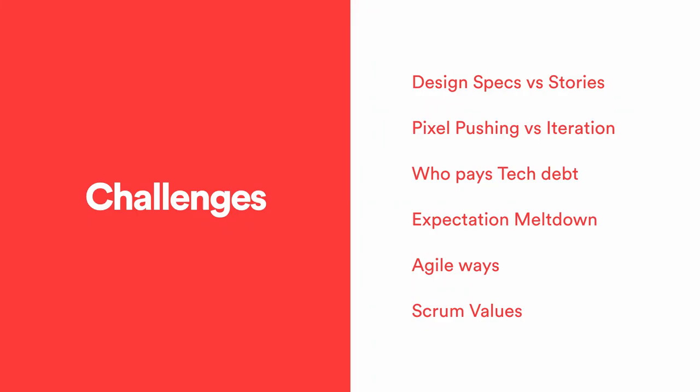So technical debt is, a shippable increment might be 85% done, and then you move on to the next batch of stuff. So your technical debt is that 15% that you decided to live with for an iteration to be finished later. And after time, you've got 100% worth of stuff to do with all those smaller percentages.